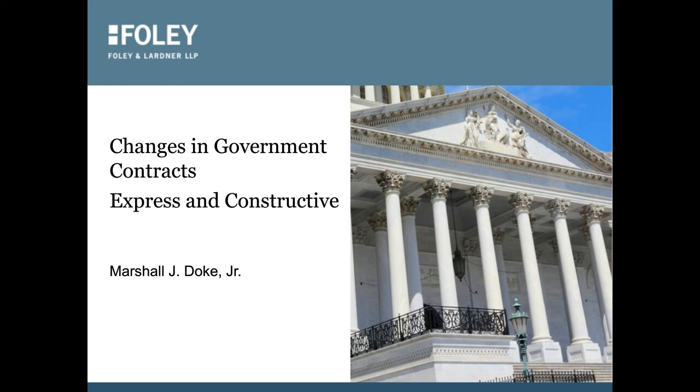Acceleration is another constructive change area. If the government refuses to extend the schedule when there has been an excusable delay, that can be acceleration. In order to recover their increased cost of acceleration, the delays must be excusable.